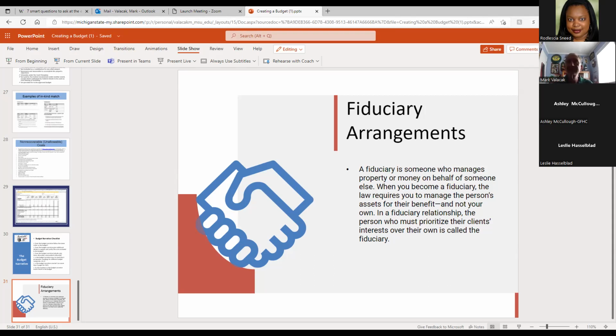Yeah, I'll just add that for me, doing budgets, one thing that has come up, sometimes you'll submit a grant with a certain budget and the funder may decide, hey, we're not going to give you this dollar amount, we're going to reduce the dollar amount. And so you kind of have to work through where you can make cuts, which can be challenging. Another thing that might happen is that you get a quote for the cost of something, and then by the time the grant gets funded, the cost for that thing is a little bit higher. And so you have to think about how to make adjustments, what you'll need to do to be able to pull off the work given those kinds of changes.